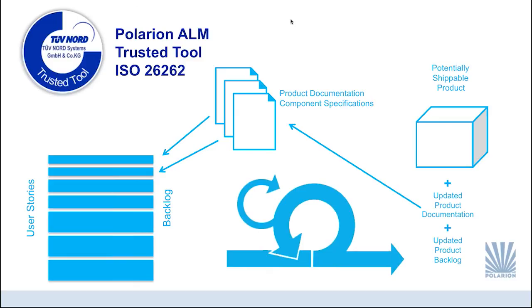They were saying that they don't require all the specification documents to be written up front in the waterfall model, but they were extremely happy that we were ensuring the product documentation and the component specifications were updated every sprint as an outcome, and we pay big attention to make sure that all this information is up to date. They understand this as a very important part of the agile process, that this even improves the overall expectations of the certification authorities for having the specification documents up to date.